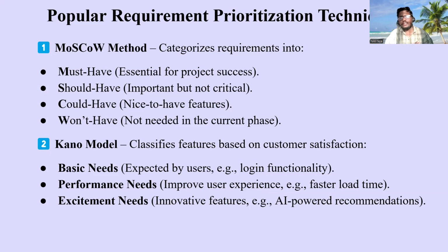These are optional, they are not so important, not as important as must have. Must have is for sure the soul of the product. Should have is important. Could have is nothing but they will be building the user experience, they will be delighting the user experience. For example, the color patterns and all those designs are could have, but they are not so important. But they are nice to have. They can delight the users. And then won't have requirements. And could have can be 3 to 4.